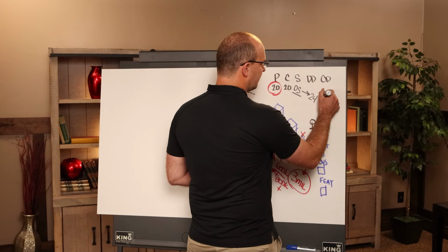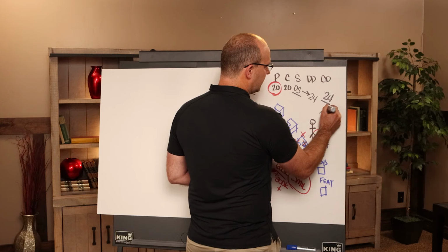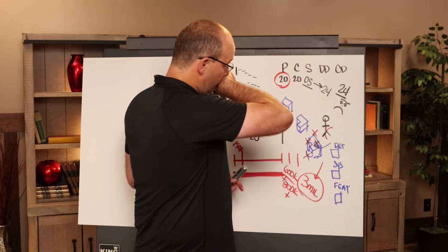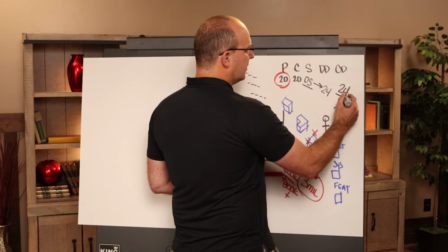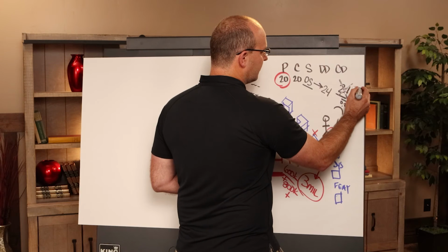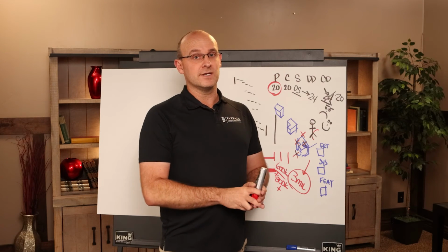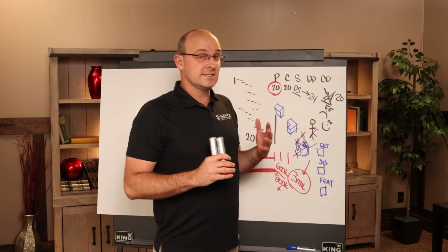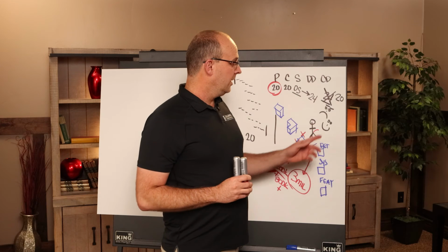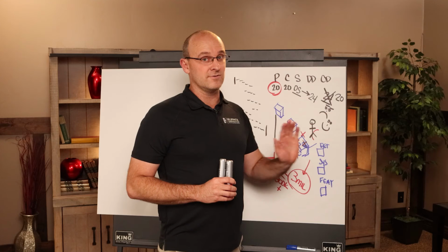We're still at 24 months if you're sticking with it, but now the building owner and the architects are mad, grumpy, and you've started off in the wrong way. Or you say, no, I want my owner to be happy, we'll eat it. It's actually not 24 months, it's 20. Now what happens? Now your project is going to be a dumpster fire inside of a burning building, inside of a solar flare. It's going to be an absolute nightmare because you cannot rush and push and panic a job site and do anything other than finish later.